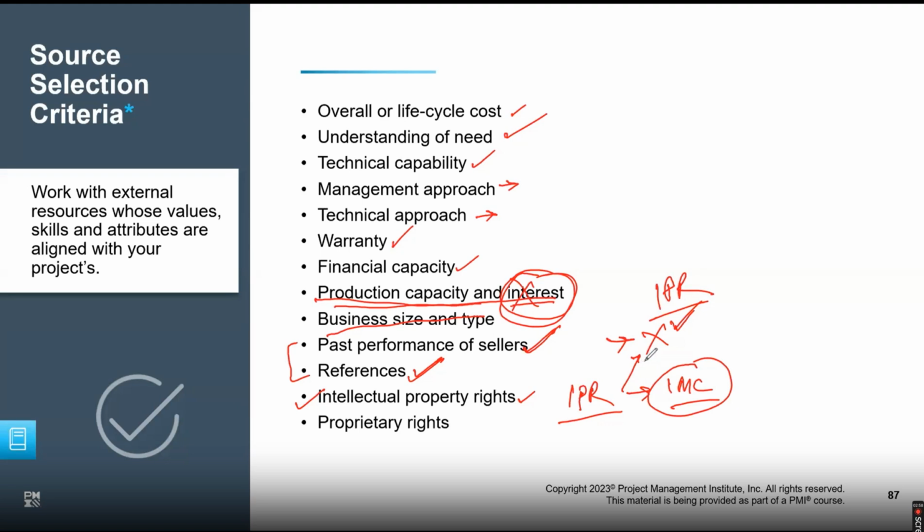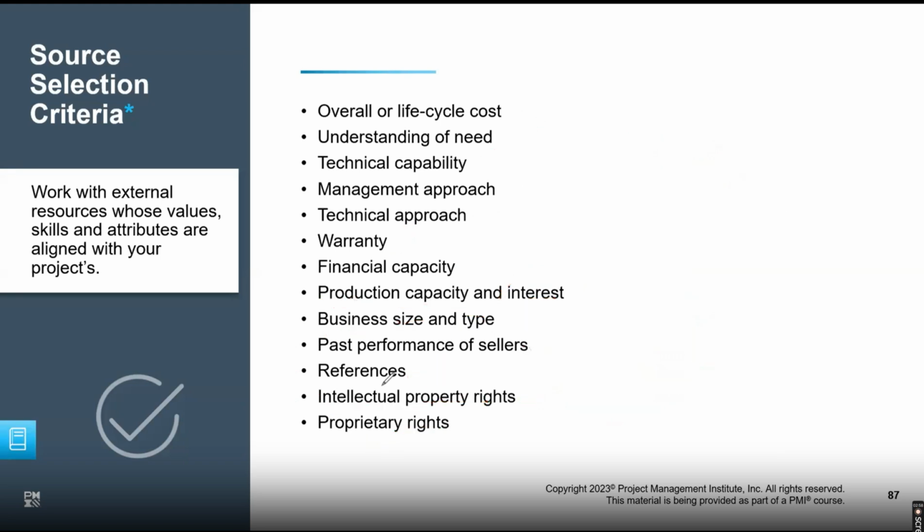Bottom line, we have to understand whether the person who's going to do the job, say somebody we hired to design and develop software that we are now selling in the market, is ready to let go of IPR. We don't want this person to come back with a legal claim that they designed this software and now need some money, that they're also a stakeholder and should be given profit out of this sale. So we need to understand whether this person is ready to let go of IPR and any other rights or claims. Whatever job they do, they cannot make any legal claim in the future that it belongs to them. That's the IPR part.